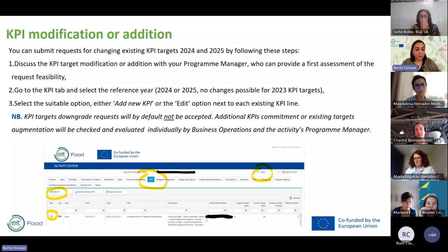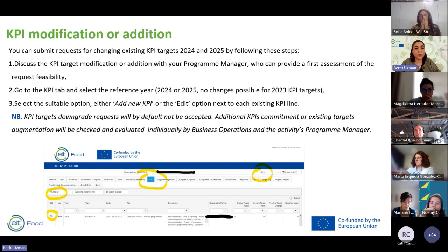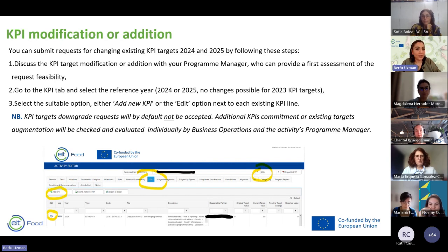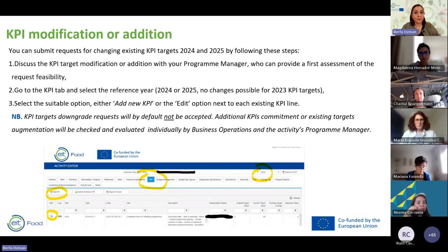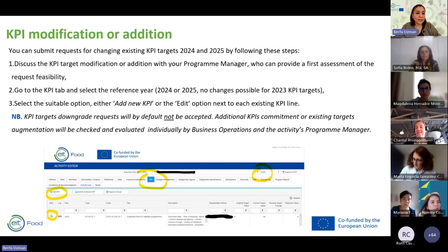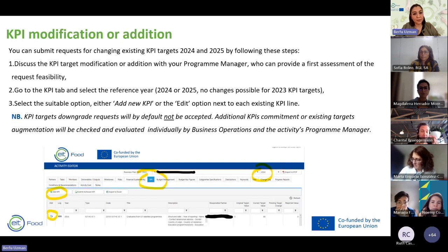KPIs are another item you can modify or add. You can submit requests to change existing targets, but you are not allowed to submit decreases in KPIs or deletions. Discuss KPI target modification or addition with your program manager first. In the KPI tab, select the reference year — since 2023 is gone, only 2024 and 2025 can be amended. KPI target downgrades will by default not be accepted. Additional KPI commitments or existing targets will be checked and evaluated by the Business Operations team and the activity's program manager.